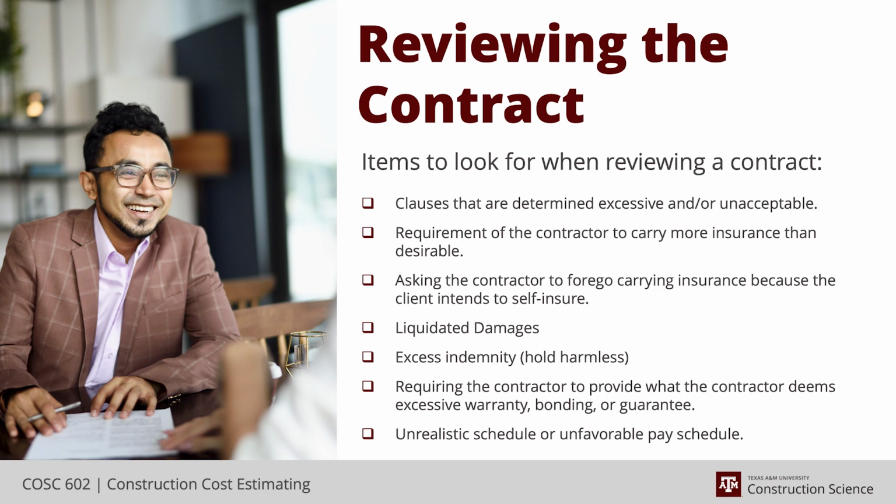We refuse to completely align with that because even though they are self-insuring the project, and most of the incidents that would occur on the project would be covered by their insurance, it typically doesn't cover everything on the job site.